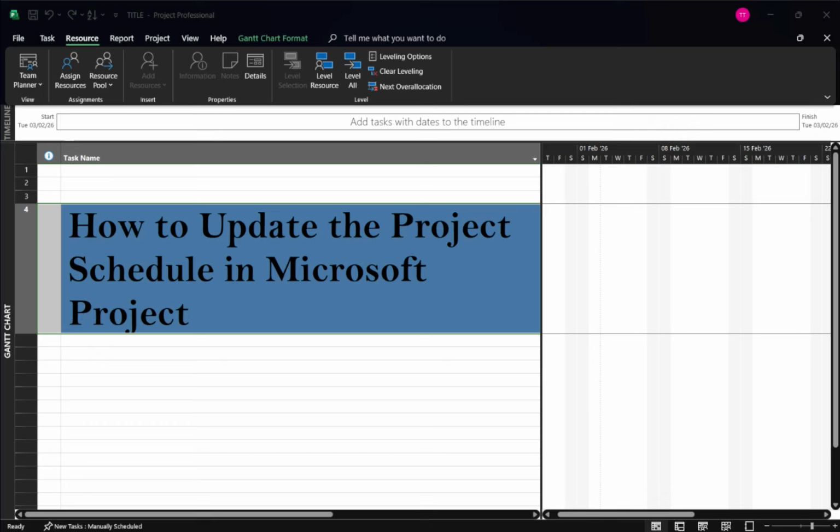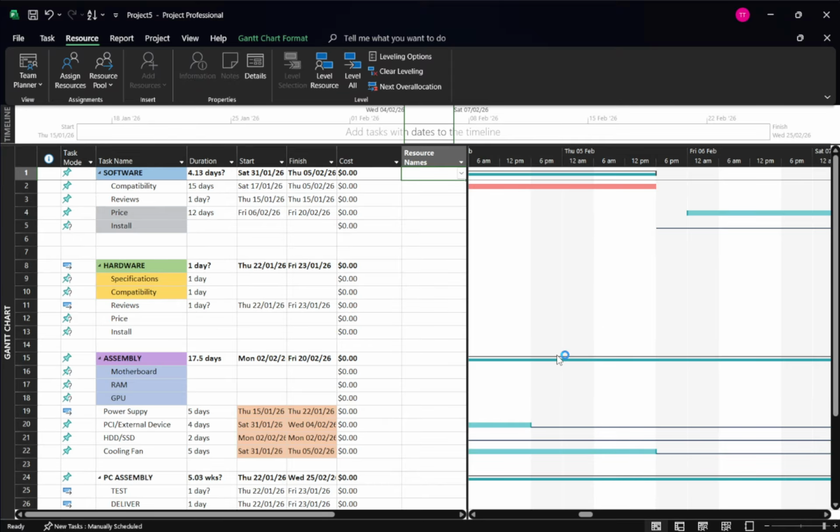In today's video, I'm going to teach you how to update the project schedule in Microsoft Project. By the end, you'll know exactly how to bring your plan up to date, reflect real progress, and clearly see what still needs attention. First, set the status date. This is the anchor point that tells Microsoft Project, consider progress up to here.